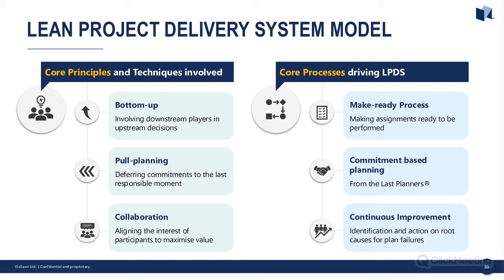Then it's really important to defer commitments to the last responsible minute. So when we are speaking to those subcontractors and getting the last planners to commit to their activities, you don't want them to do it a year in advance because the scope of work can change dramatically in that time. But you don't want them to commit, okay, I'll do it tomorrow. You want them to commit at the last responsible moment before it could cause an issue, okay? So to make it much more efficient and things like that.